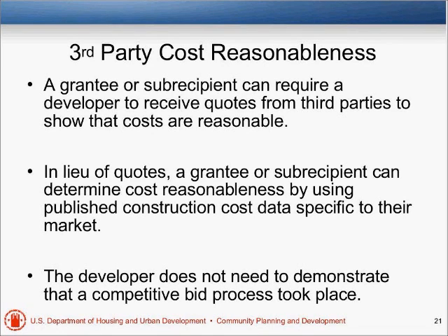So I have often also seen some of your colleagues, when the receipts come in, pay directly to the contractor doing the work, if it becomes a problem where you've got nonprofits that don't have access to the cash in advance. Well, I'm blessed with a nonprofit that has access to the cash and a good contractor working for them too. Sounds good. Okay, thank you, Stan.